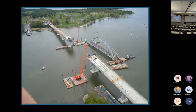And Ronnie did both. So High Steel did both, and he worked out of two shops. So he was doing the arch in one shop and he was doing the approaches in the other shop. And in my view, that really saved a tremendous amount of time. We would not have been able to build this bridge this fast without it, not only because we're building on alignment, we had to demo existing foundations and build new foundations on the same alignment. So that's the float-in operation.